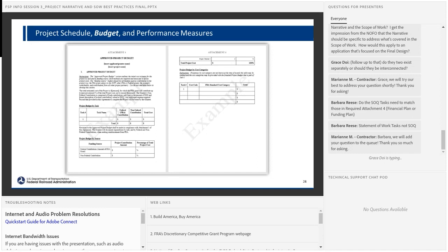The next table is project budget by source. And Jenny's presentation mentioned this for the project narrative. This is where you have the percentage breakdown, federal versus match. And if, for example, you have multiple contributors to the matching funds, you can add rows to this table to show, for example, if your municipality is the grantee and is contributing some, but an industry is contributing some, or a railroad is contributing some, FRA wants to see here who is contributing how much. And again, make sure it matches up with what's in the project narrative.